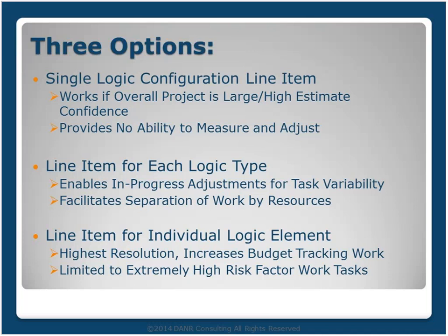And this provides really high resolution into the work being done, but it's usually overkill, and it makes budget reporting and tracking very cumbersome. I mean, think about your engineering team having to track their time at that level of granularity. They would spend more time tracking their hours and trying to charge to the right code than they would actually doing the work. So about the only time that you would want to use that maximum level of detail is when you have an extremely high risk area and you've got some concerns there, and you really want to just focus in on it.